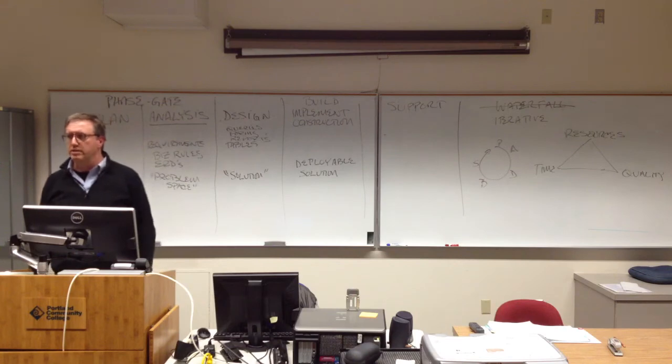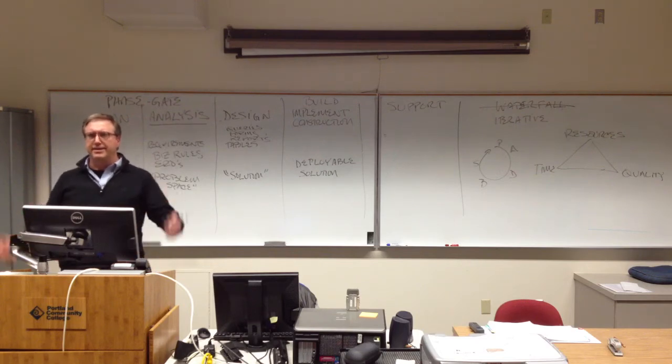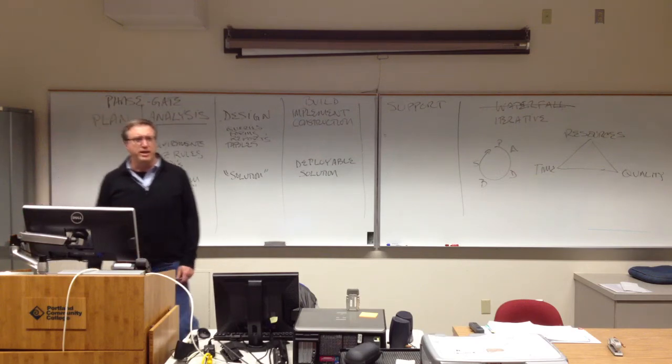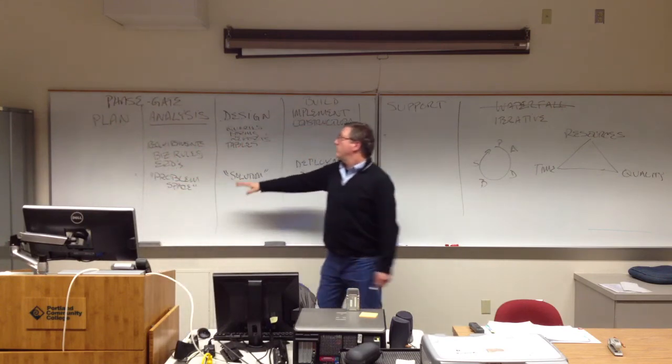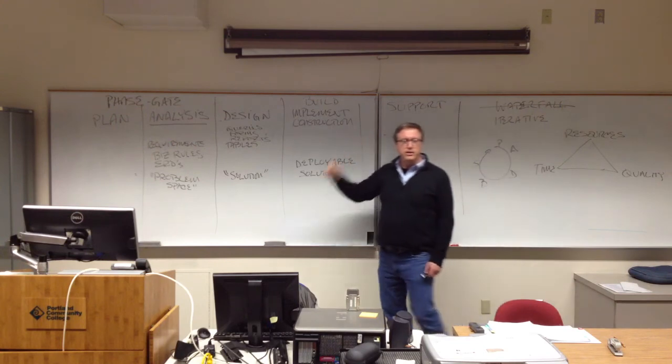2 to 4 weeks. So in order to do that, we have to bite off little tiny bits of functionality. Okay? So I've got a website. What's my first iteration? Well, let's just get the thing to serve up a page. Just one page. Okay, how do I do that? Well, I'll build it up. Oh, now I get a website. Ah, it's serving a page. I'm done. What's the next thing?